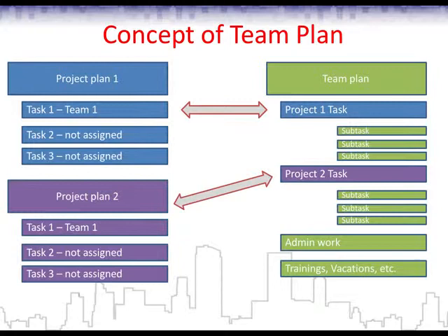And this team plan, of course, should incorporate tasks or WBS elements that are assigned to this team. Those tasks should get into this plan automatically when they are assigned by the project manager. And the main attributes of those tasks, like the duration, work amount, start and finish, etc., should also be copied to the team plan, so the team lead or resource manager should see this information.